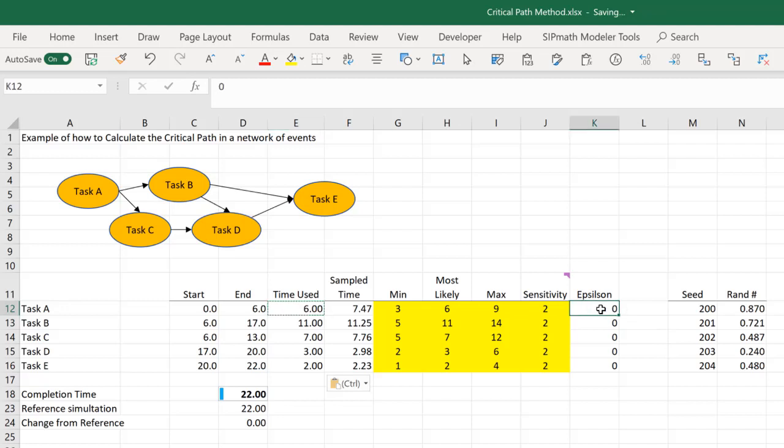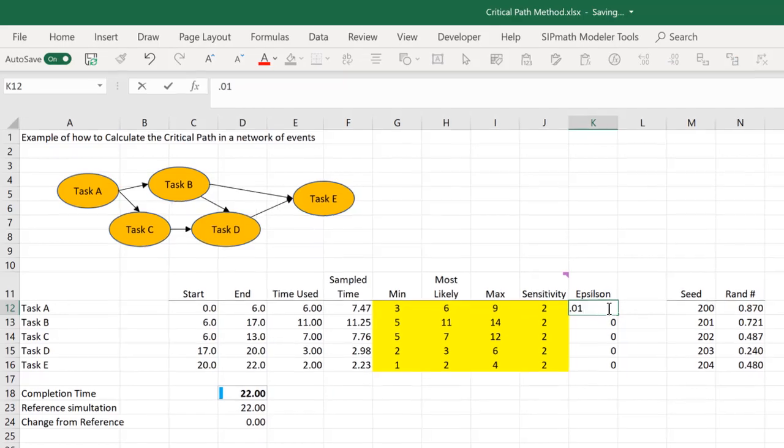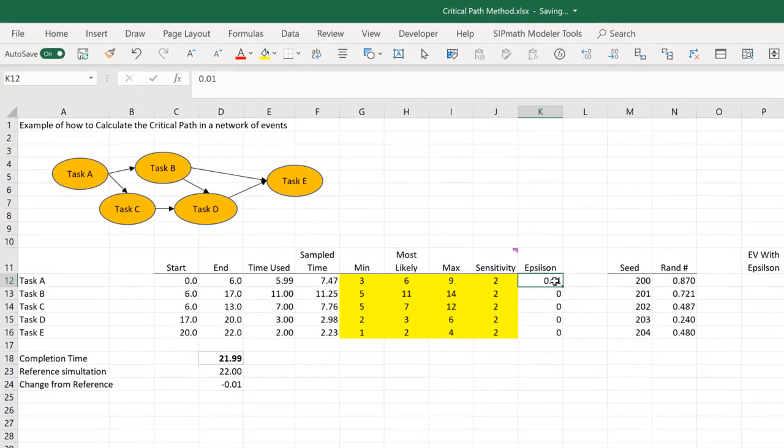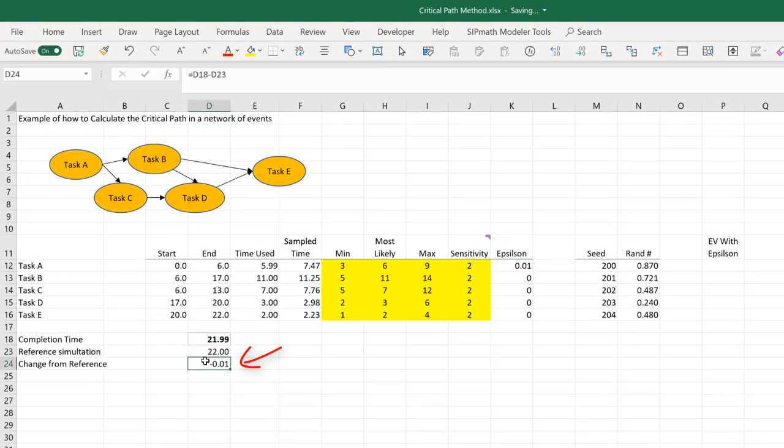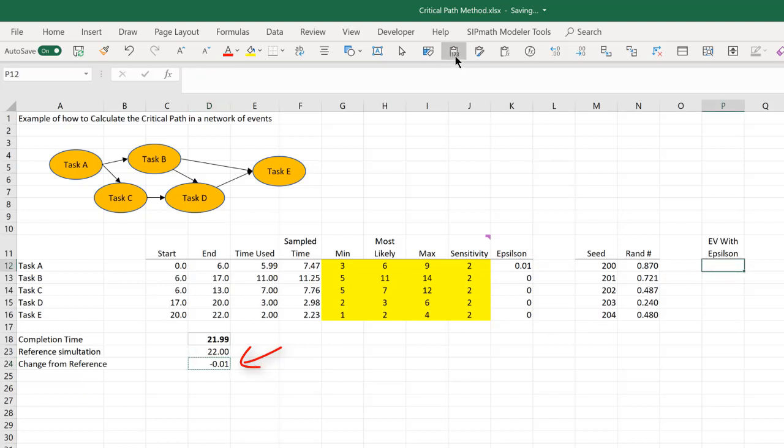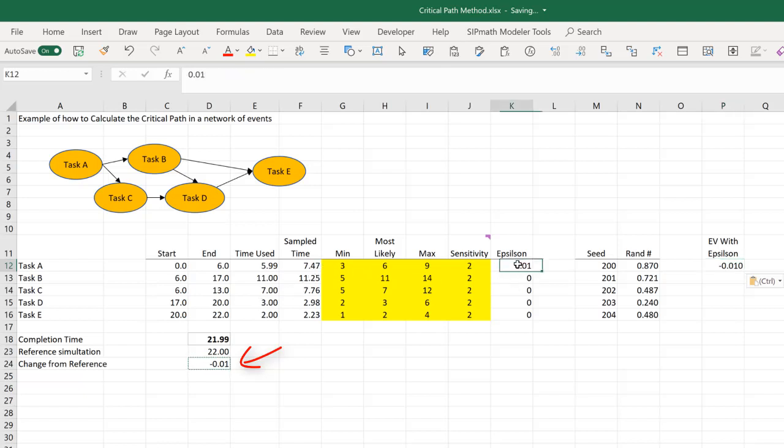So let me put in an epsilon here, and let's see what changes. So I'll put in a 0.01 here. And we can see that this went down by one. Let's copy that over to this epsilon.